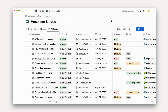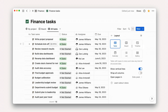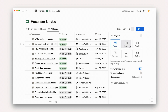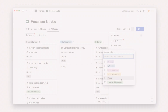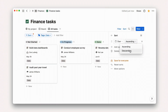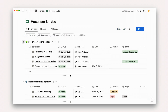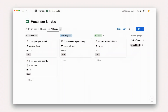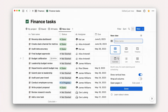To customize an existing view, click on the three-dot menu in the top right-hand corner. Here, you'll see a myriad of options, including layout, which alters the way information is displayed, filtering and sorting information, and grouping — like in the case of our default view, which is grouped by projects. To add a new view, click the plus sign, select New Empty View, and follow the same flow to customize.